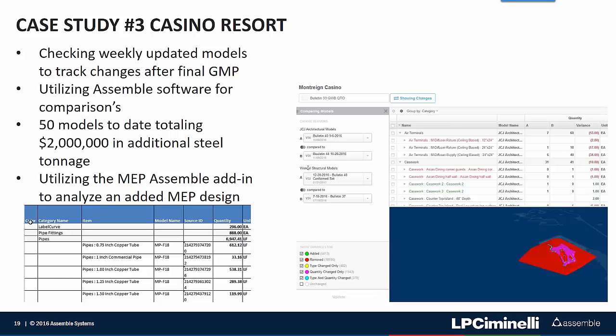One of the other things that happened during this project, David was actually out of the office, and I received a phone call saying, hey, here's the deal. We never had a design for the top floor of the hotel for mechanical piping. We've gotten a model, which is their accepted design, but we need to take it off to understand what the PCO and the CO is going to look like. So we had a change order that was coming. We needed to have an estimate for that change order, and I had an AutoCAD model to go off of.